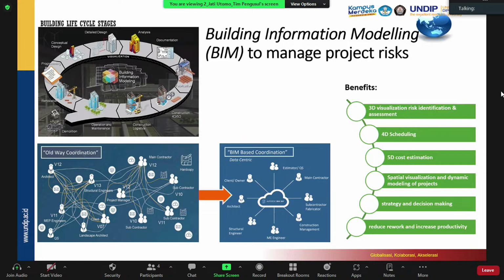There's a feature in BIM called clash checking, where we can check whether the installation of the mechanical and electrical will clash with the structural elements. That's very useful because that problem happens a lot on the field, particularly in the past. Quite often it is too late because the building is already there, and the MEP team then found that their elements clash with the structural elements.